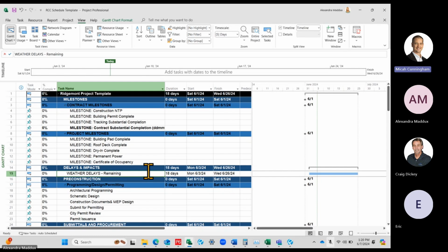And then once you exceed the 3 days per month, you let it push your schedule. Yeah, 7 days in a month, you're only going to take all 3 of them. Right. So you'll take off 3 from your bank and then you'll let the rest of them push the schedule out. Sometimes it's not day for day, because if you encounter a weekend, it's actually more days for those extra weather days. If you push from a Friday to a Sunday or a Friday to a Monday, that's 3 calendar days, but 1 working day. So you would let it push for anything beyond that.